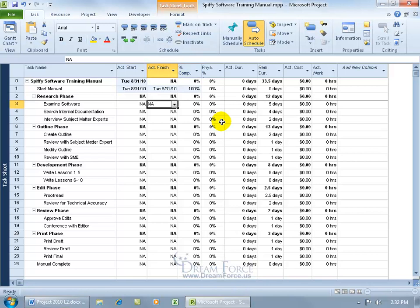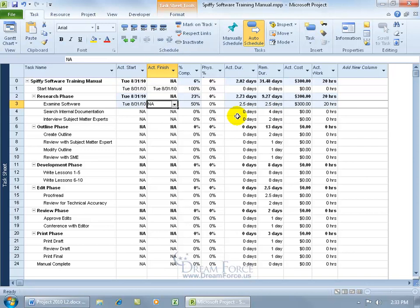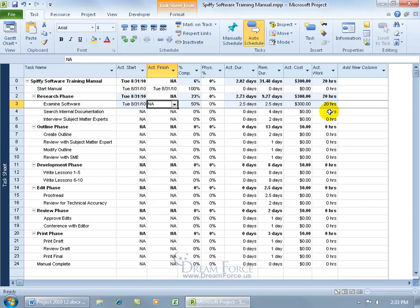Let's go down to the next task and let's say, before I go ahead and mark this 50% complete, notice that the remaining duration is five days. So the duration is a total of five days. If I say 50%, you can see 50% complete, and it puts in the actual start date, because I didn't type it in. Project assumes that we're going off the default plan, so the default was August the 31st, 50%. Actual duration so far is two and a half days, but we still have, of the five days, two and a half remaining. And then, of course, the actual cost, and then in a five day work week for the one resource, Rider 1, 20 hours is half of 40.